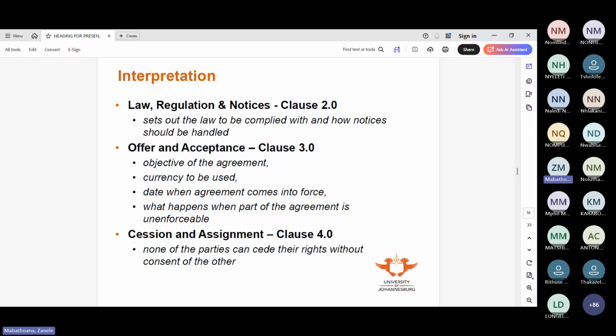These are covered in his preliminaries because these are things that need to be done. And then the employer as well shall, not will, comply. It's not a matter of choice. They must comply with the law. They will also obtain whatever permits need to be obtained by them during the planning, any building or similar permissions, and pay charges for the works other than those which are the responsibility of the contractor.